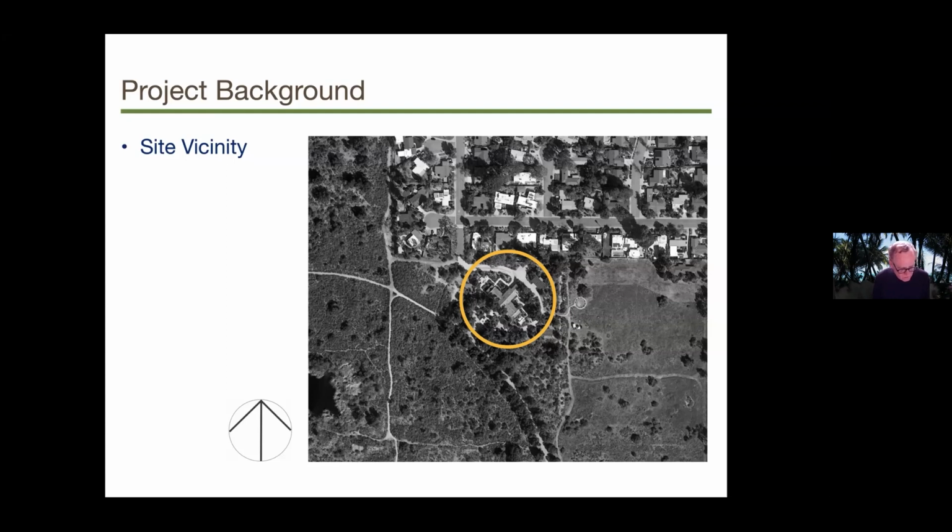The college decided to do a feasibility study of locating this program in the building, as I said. They were going to either renovate the building you see right there on the site, or demolish it and put an entirely new building there. So they took the opportunity to evaluate renovation versus new construction, and that's what led them into the embodied carbon study. The feasibility study was a typical academic feasibility study, involving developing the building program, a construction cost estimate, and energy modeling, and then the new thing was doing an embodied carbon assessment for the two options.